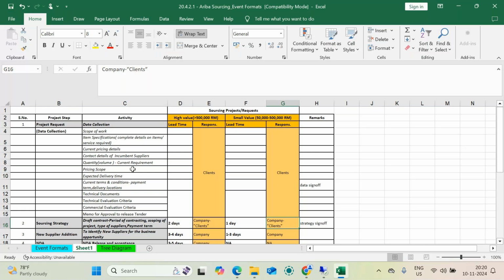That is not a value where you can put the effort. But if that material is recurring, you are buying this month, after 3 months you want to buy it again, within 1 year you are buying that material 4 times. What you will do is decide the price for the entire year in a single shot. You will say, I want this material for the entire year, but I will send you a PO after 3 months, when I require this material. So collaboratively you are doing the auction for that quantity, so you'll get the best price from the market. So that is a strategy.